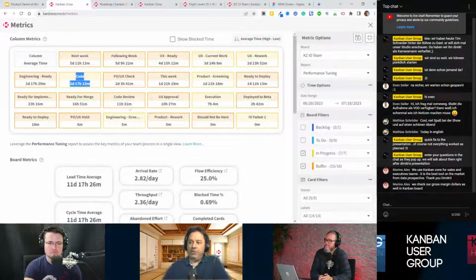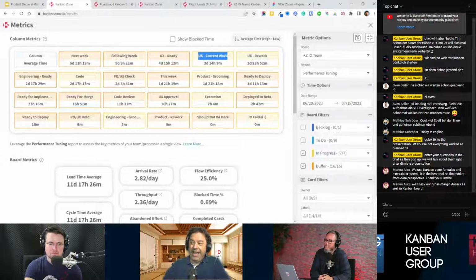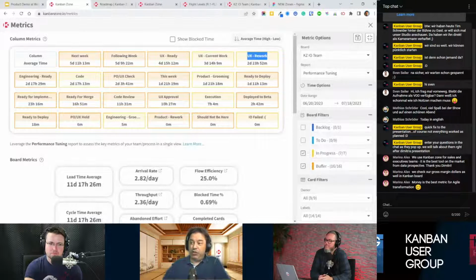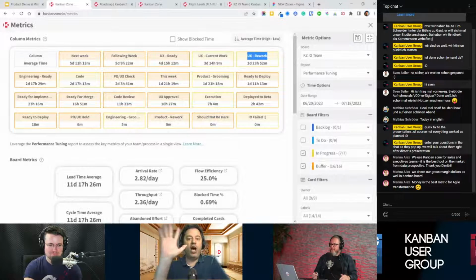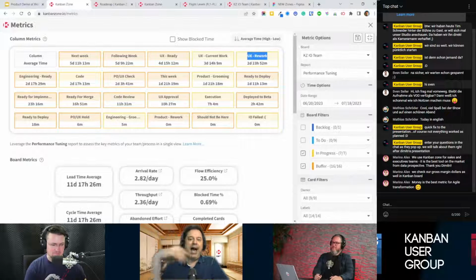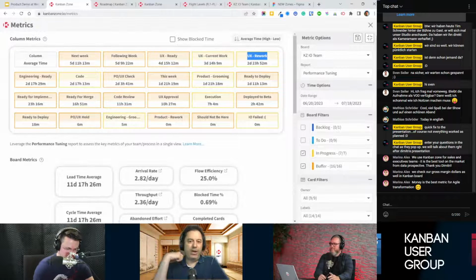What I need you to do is to pay attention to what is going on with your board. And what's going on right now is your UX is quite busy, in fact, spending more time than your developers, and they have this rework which doubles the time. Long story short, please do not give me 5 developers. How about you give me 1 UX designer? Because that would actually help me.